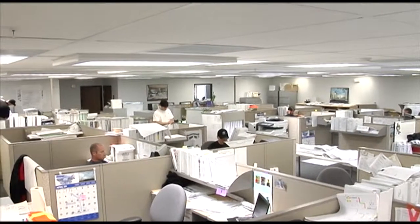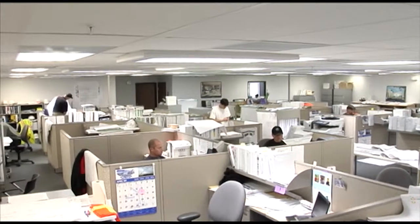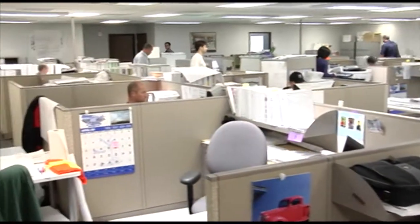The big room is a large office space and information center located at the construction site. The big room is a key component of lean project delivery, and it allows BIM to occur in a big room with all the detailers working side by side. Everything is done in real time with real people, standing together, working together on daily issues, if not hourly issues. Again, productivity is enhanced, quality is increased, communication is tenfold.